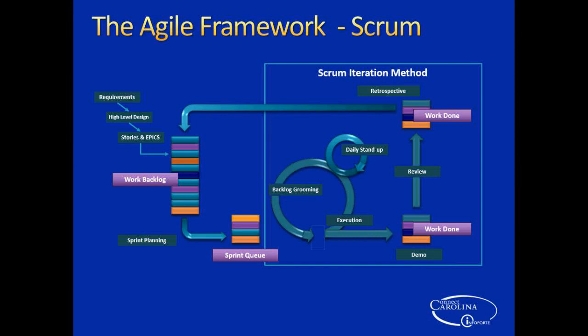Here's the infamous Scrum framework, right? You have the work backlog. And the thing about Scrum is it always comes from one set of requirements breaking down to the high-level design, right? Fills this. There's sprint planning that goes on at the beginning of each sprint, right? It says, okay, what user stories are we putting in the input queue? And then we go through this, I'll say 2-week cycle, whatever it is.